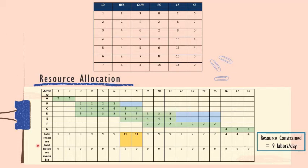We then calculate the total resources per day. For day 1 it is 3 laborers, day 2 also 3, and so on until day 18. However, for days 7 and 8, the total resources reach 11, which exceeds our resource constraint of 9 laborers per day. So we need to reduce the labor count for days 7 and 8 to no more than 9.